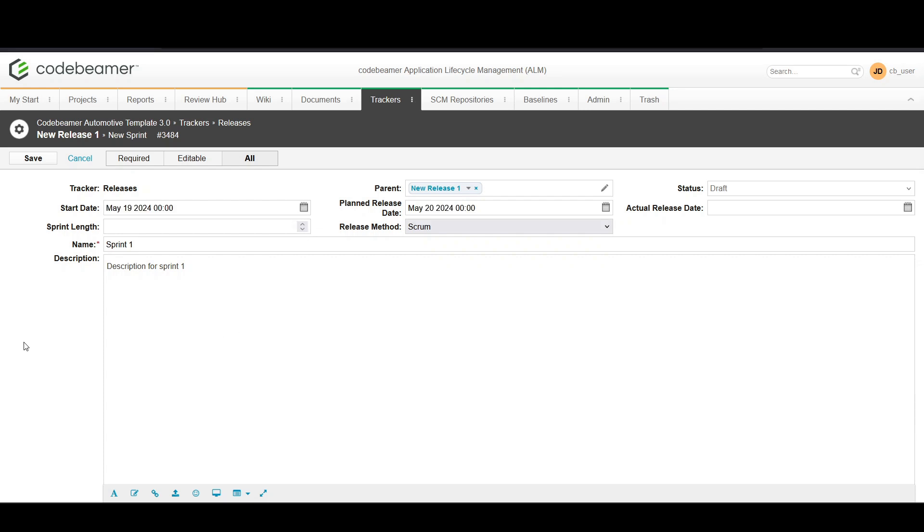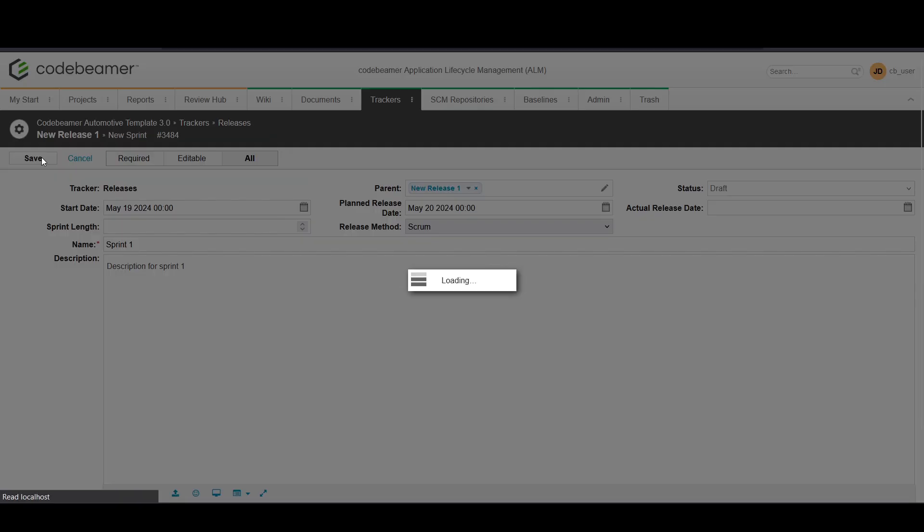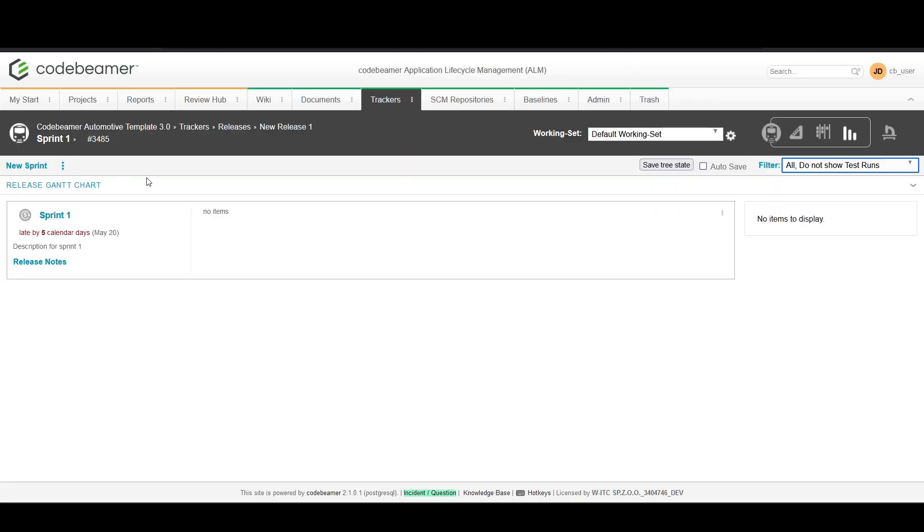Now it's time to associate work items with your sprint. You can add tasks, user stories, or bugs from the product backlog to your sprint. To view and manage your sprint alongside other project activities, switch to the planner view.